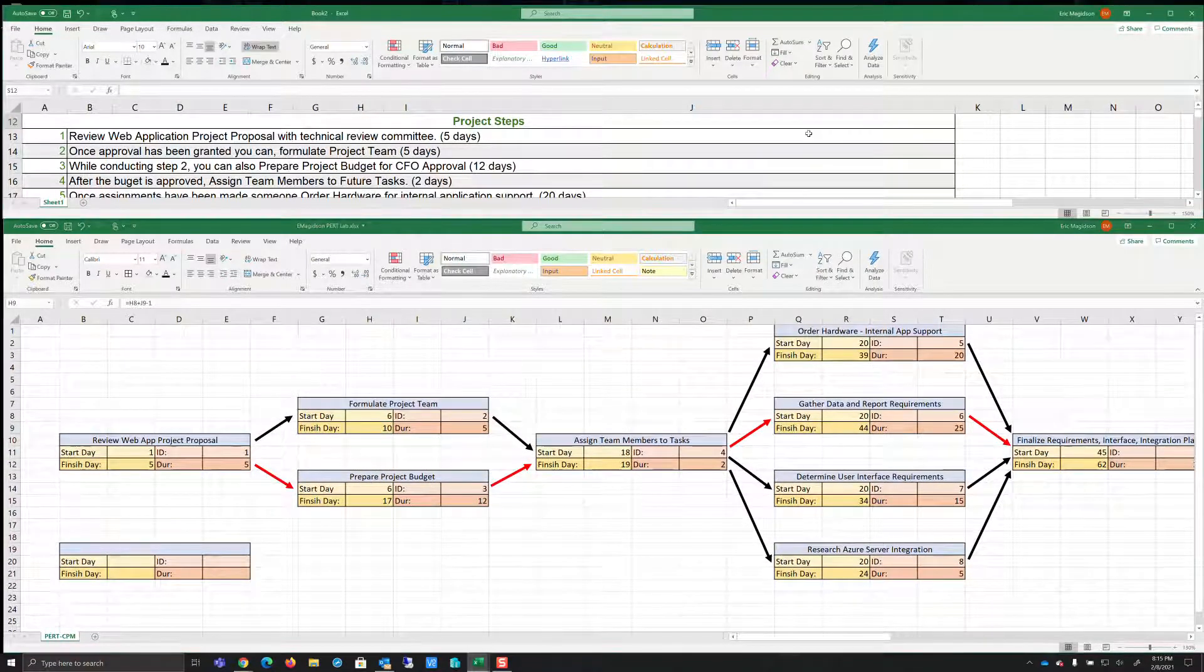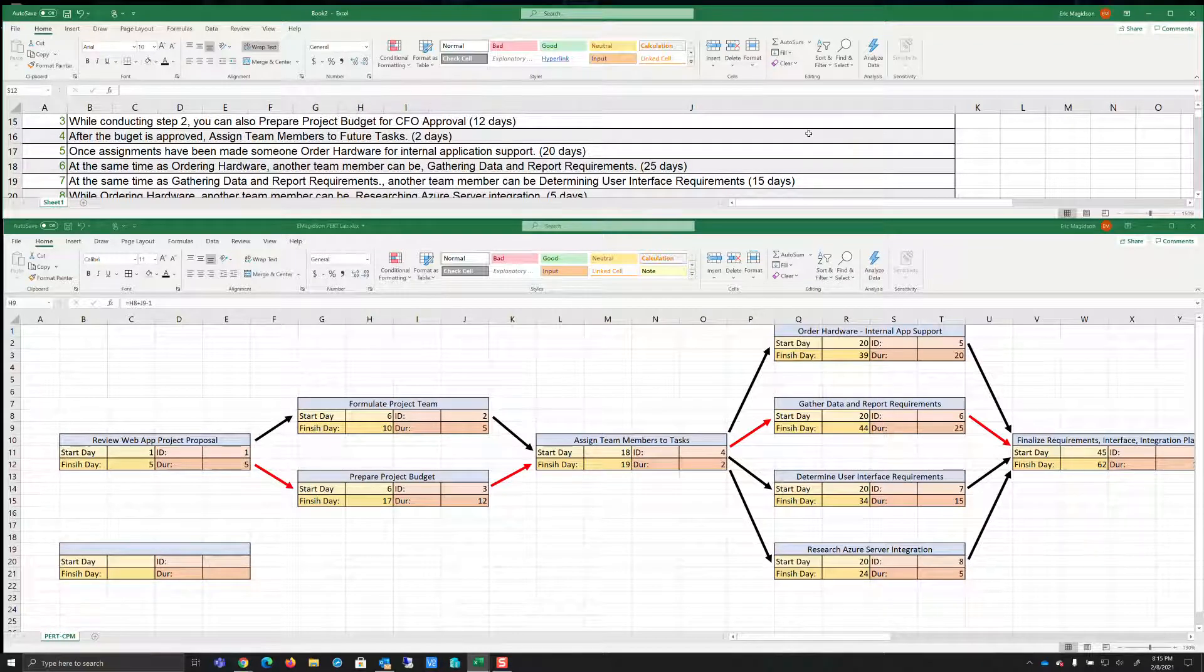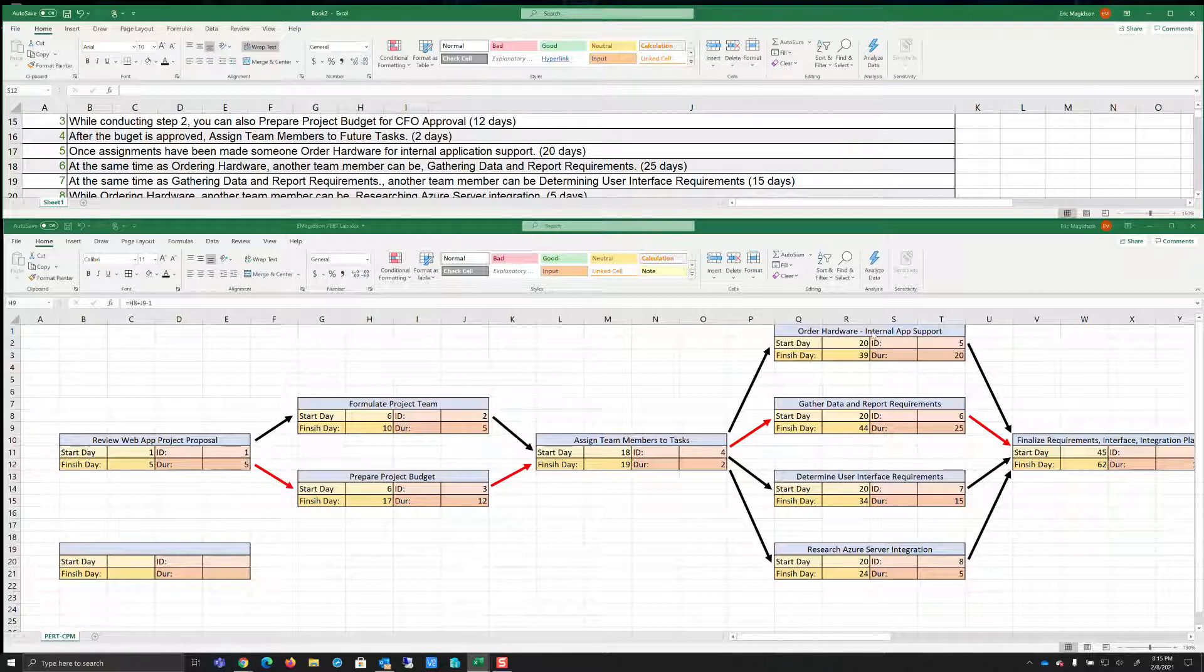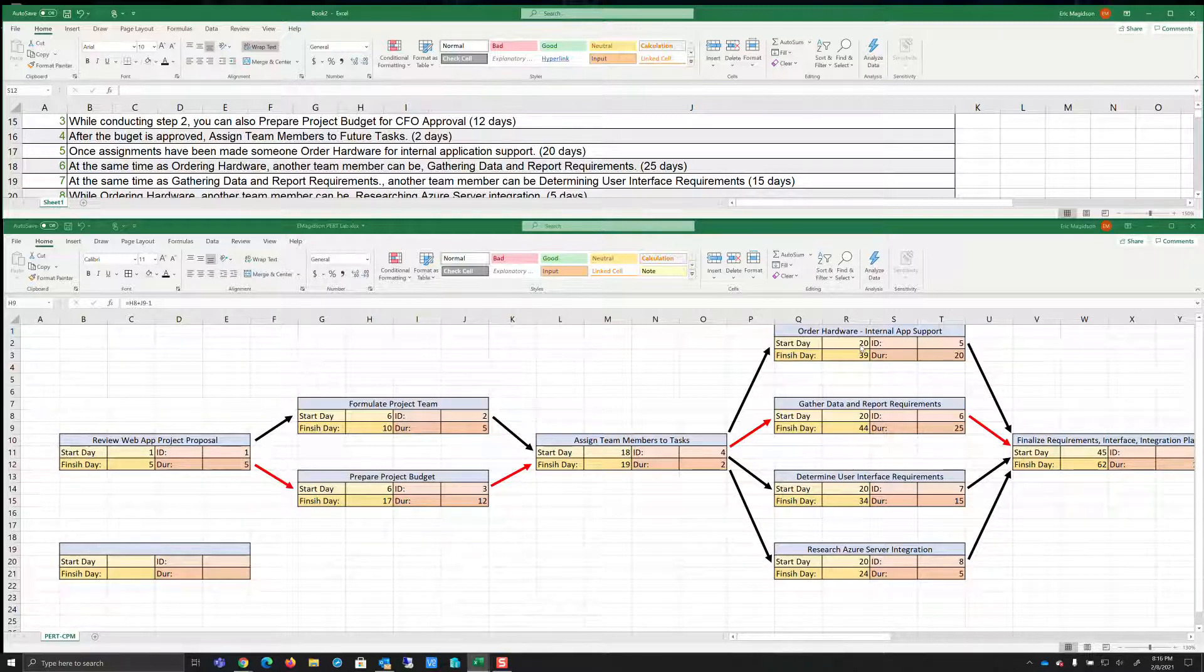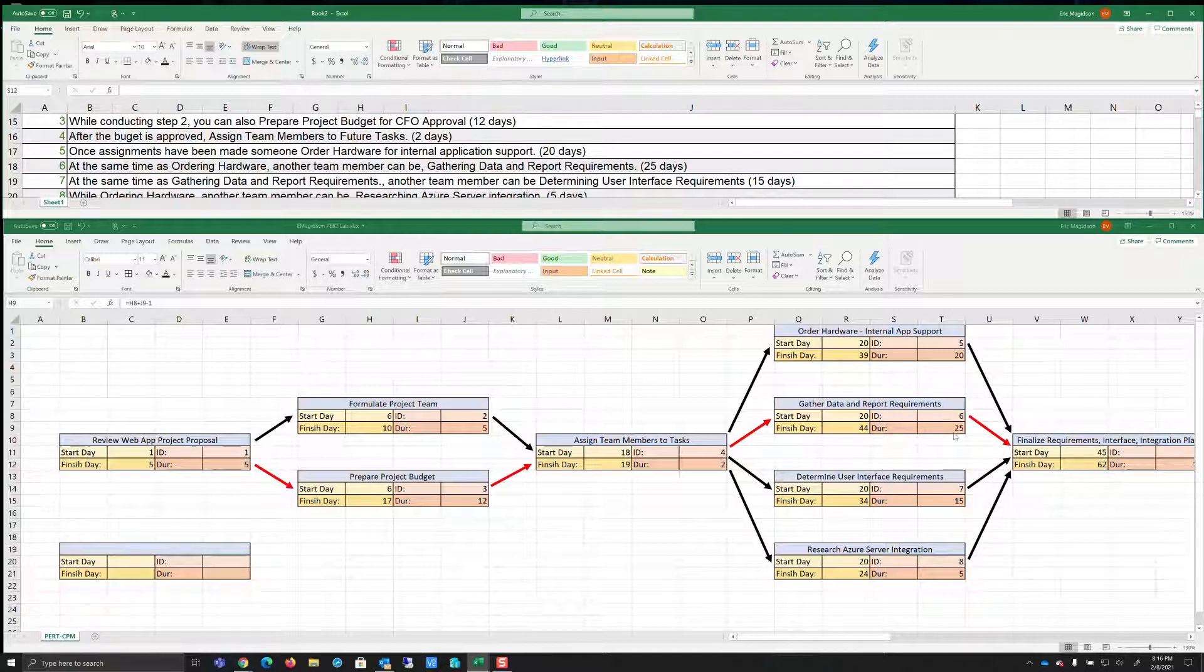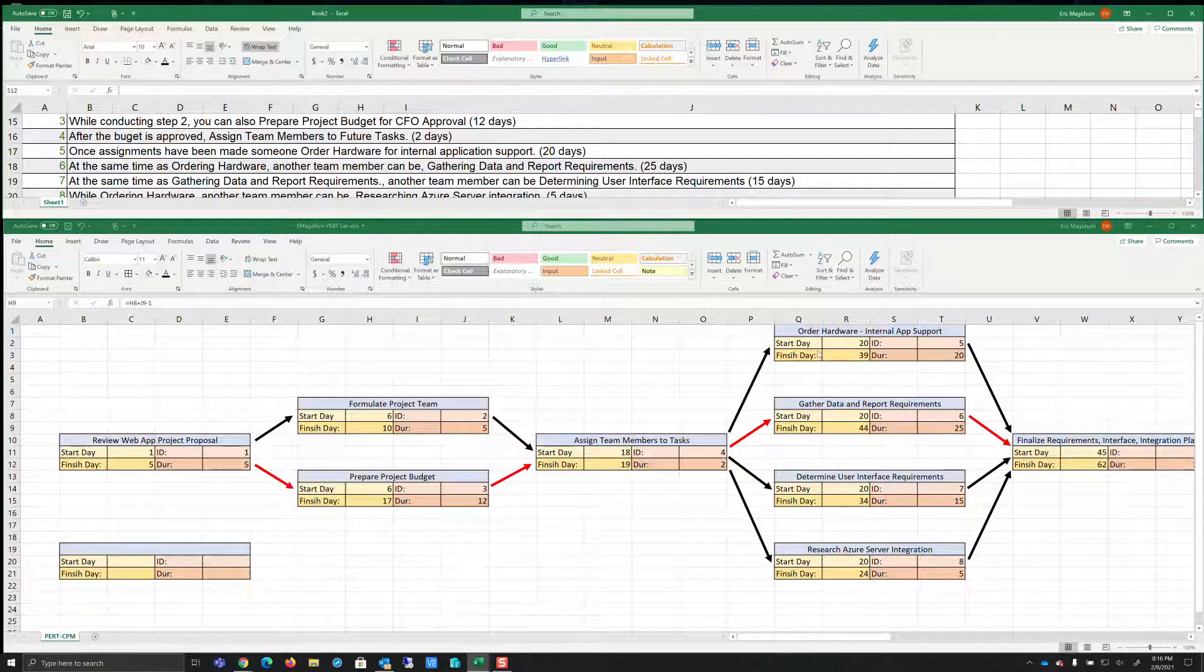Now continuing on, five says once assignments have been made, someone order hardware for internal application support. So we know we're going to be able to start this ordering of hardware and that's going to start on the 20th day. It says at the same time as ordering hardware, another team member can be gathering data and report requirements. So here's that. Now notice 20 days for here, 25 days for here. We do the math and we move on.